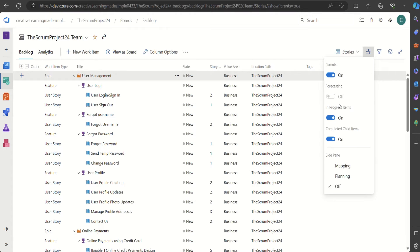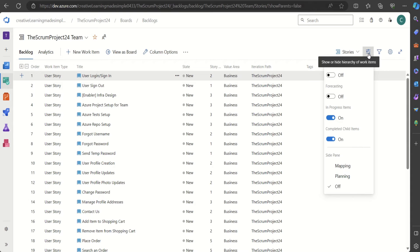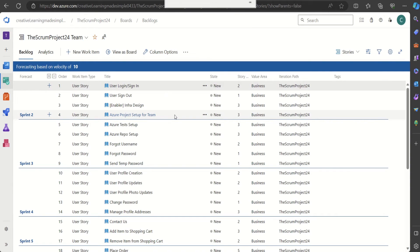This is the forecasting feature. To enable it we have to turn Parents off, because we want to forecast on the basis of stories only — the team works on user stories during the sprint. When we do sprint planning we do not bring epics or features into the sprint; the team plans, commits, and finishes user story implementation during the sprint.